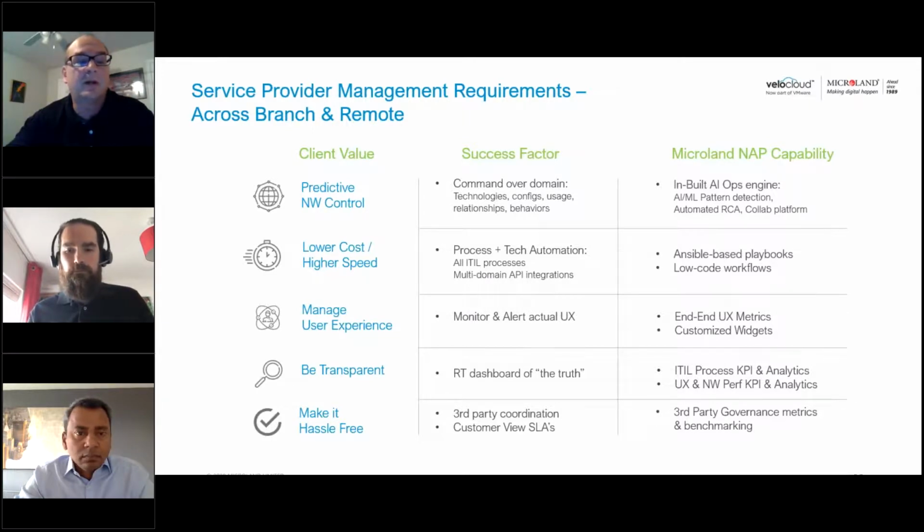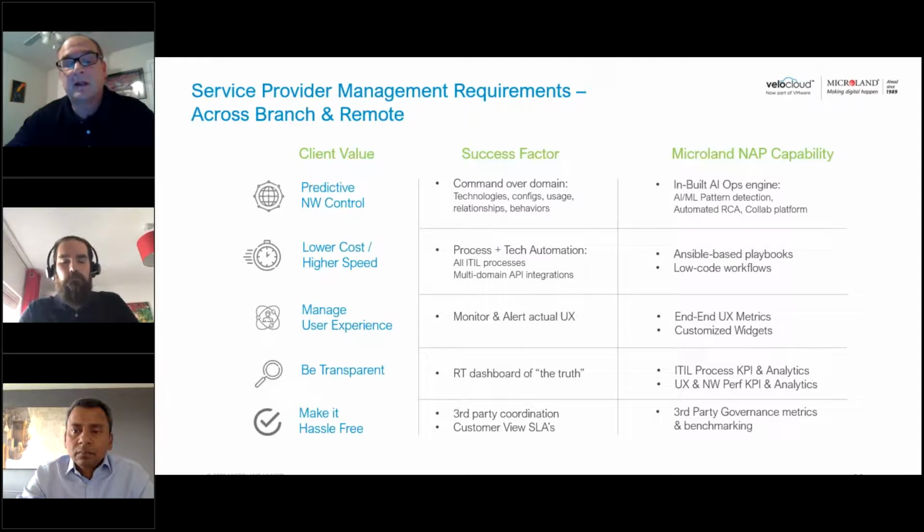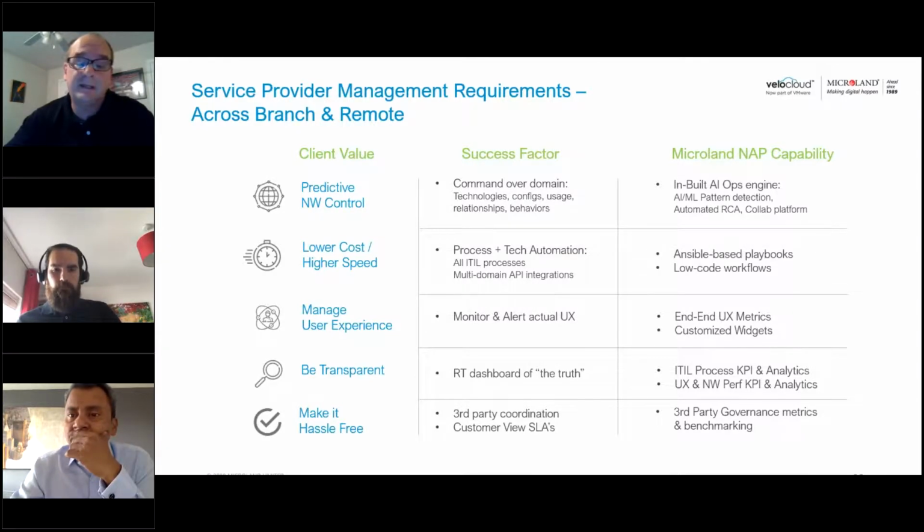Fourth, I'm going to have to coordinate all the activity across multiple organizations to have all this material converge at the right time, at the right location, turn up the site, or have support easy do-it-yourself home installations. Fifth, I'm going to need that detailed plan that covers all of these things. Not everything goes according to Hoyle, so I'm going to need the ability to adjust my plan almost on a daily basis. And then finally, I'll need to keep everybody up to date.